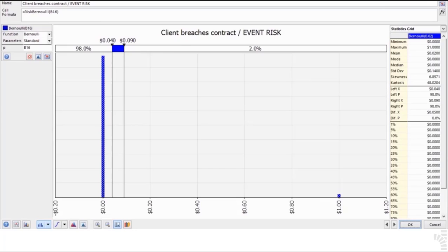This formula will generate either one of 2 binary outcomes contingent on the probabilistic value of the Bernoulli distribution, either a 0 or a 1. In other words, in approximately 98% of the probabilistic cases hinged on the Bernoulli distribution, it will generate a 0 since no event happens, whereas on 2% of the cases it will generate a number 1. However, this is yet the first part of the equation.